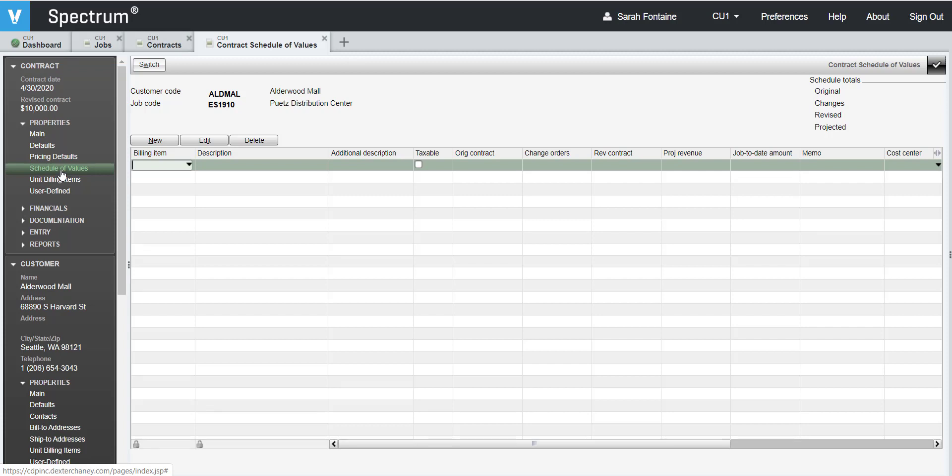When you are setting up your billing item numbers, it is very important that you structure the billing item numbers so that all numbers share the same total number length so that the items sort correctly, both in Spectrum and on the draw request documentation.